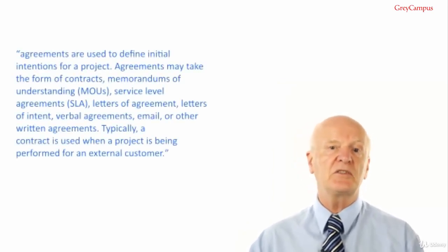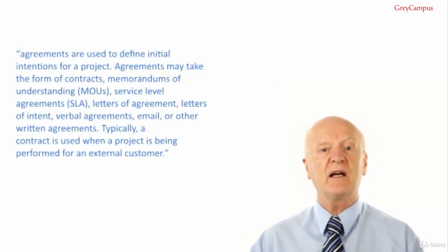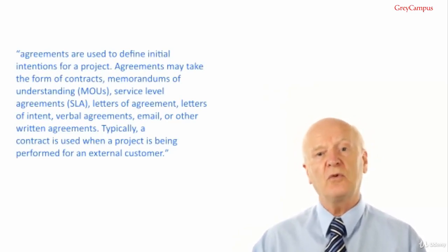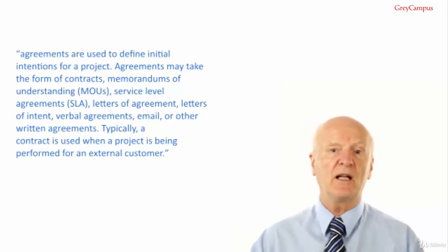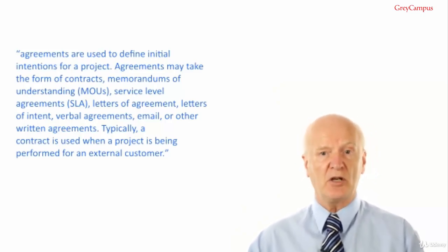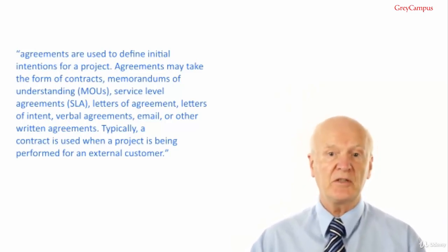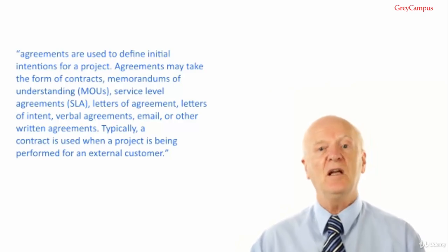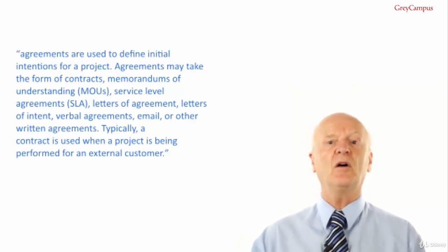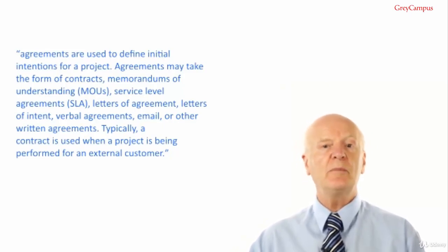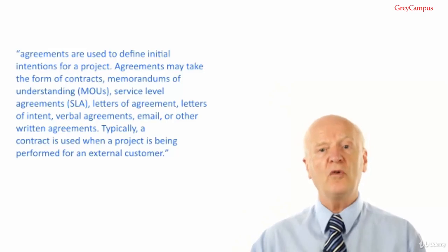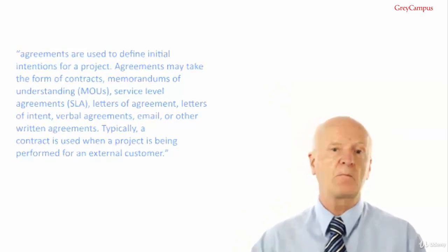The PMBOK guide tells us that agreements are used to define initial intentions for a project. Agreements may take the form of contracts, memorandums of understanding, service level agreements, letters of agreement, letters of intent, verbal agreements, email or other written agreements. Typically a contract is used when a project is being performed for an external customer.